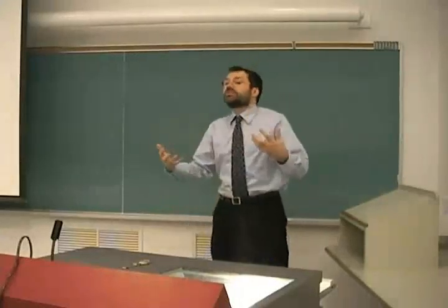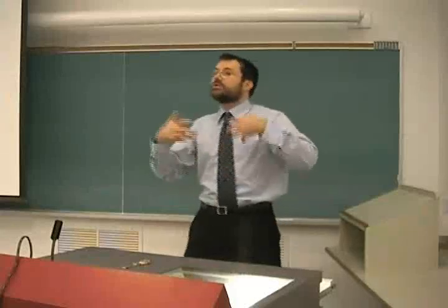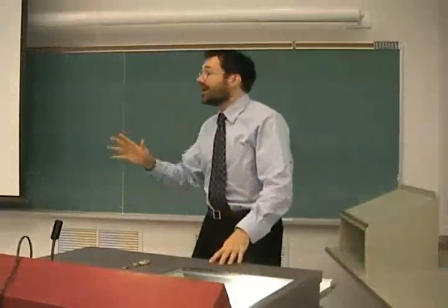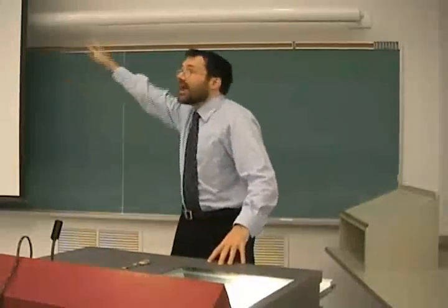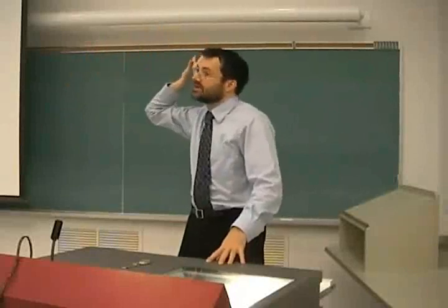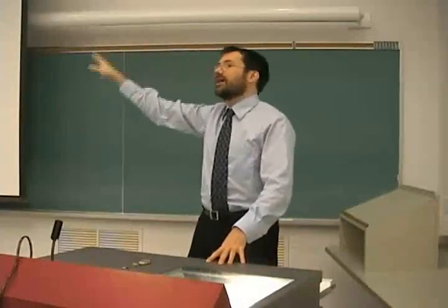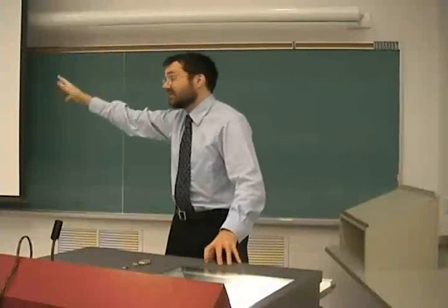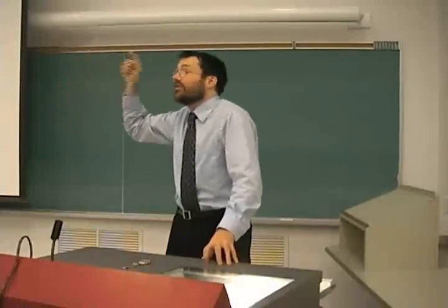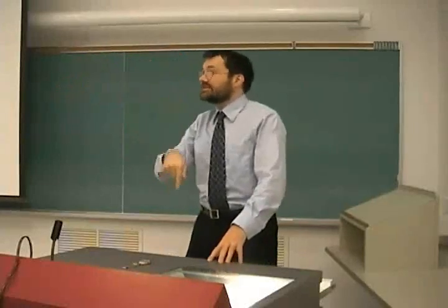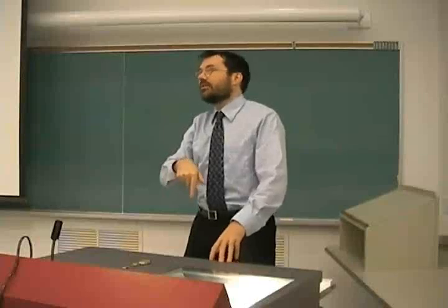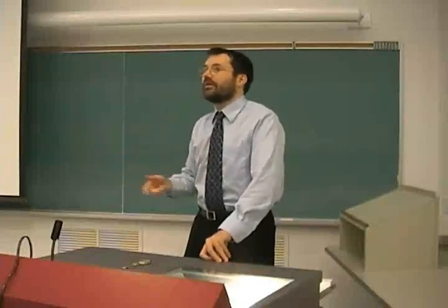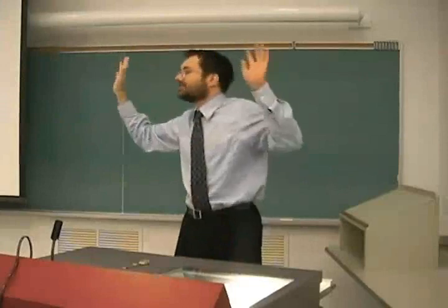You can quickly visualize all the things you have to do. An engineer can do an analysis. And most of the work is in the construction. And that can be very precisely estimated because the construction techniques, we clearly understand how much time it takes to do various things. And you can still be off. Okay? This building we're in now, they were a year over budget on their deadline and double their budget. So as bad as any software engineering project.